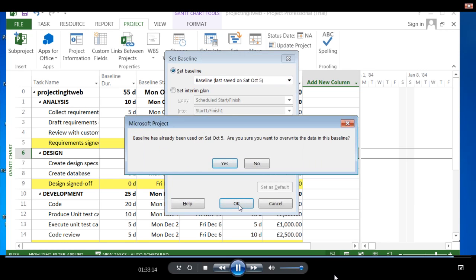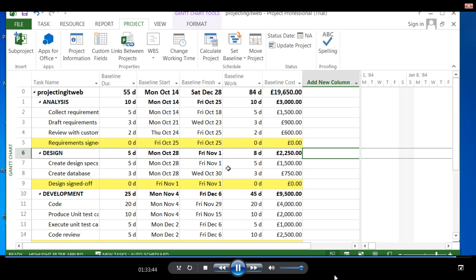It means that you are overwriting your previous baseline. If you do that, you will not have access to your original data. Ideally, we should preserve all changes made to the project so that when we do the closure review, we can track what was the status, what was the original plan, then what change came, how it impacted the project, then which change came. So you should have all the history.